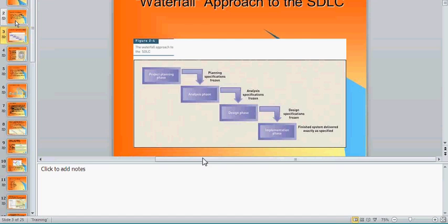What does that mean? So if you had said that you want to spend $300,000 on a project, and you have 3 months to build it, then you will gather requirements based on what can be built in 3 months' time and will cost you up to $300,000. Is that clear? What are the key features that you need?